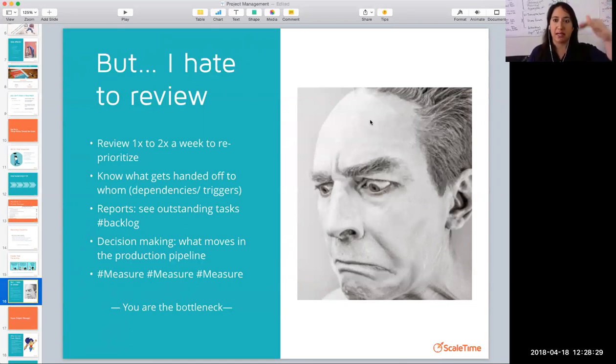If you're doing, let's say, a technical deployment of a marketing campaign, and then you need someone to start creating campaign graphics, right? That's kind of two different skill sets. You usually have two different people doing that, but there's a dependency where one thing stops and then the other one continues. That kind of sequential stuff that happens in project management, you can actually create inside of your PM system so that you're making sure that stuff still flows, which is really cool.